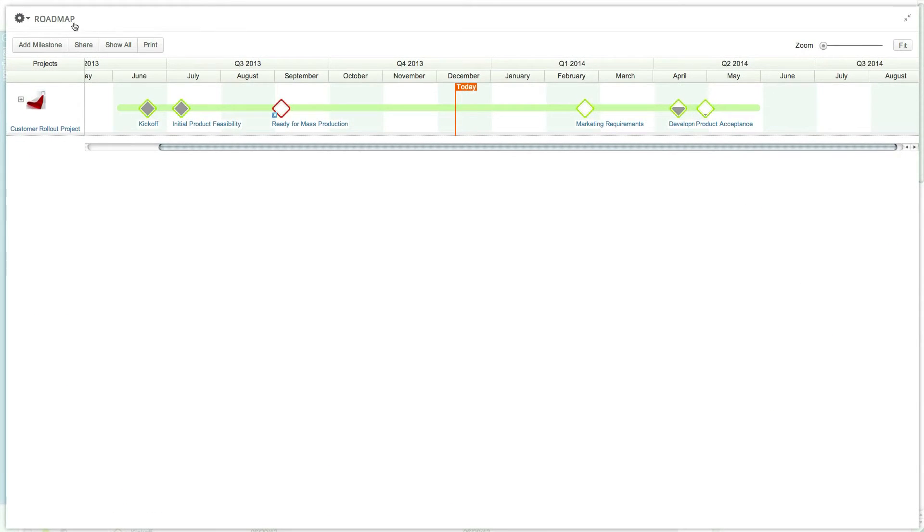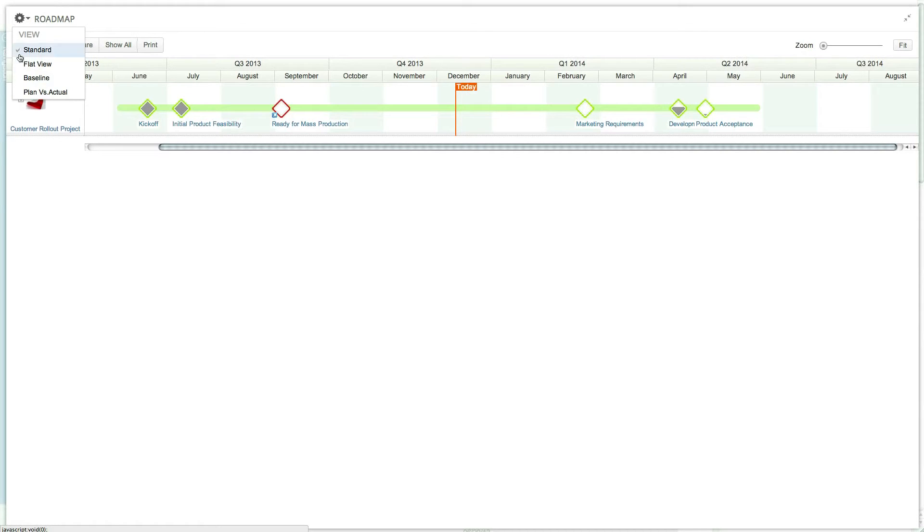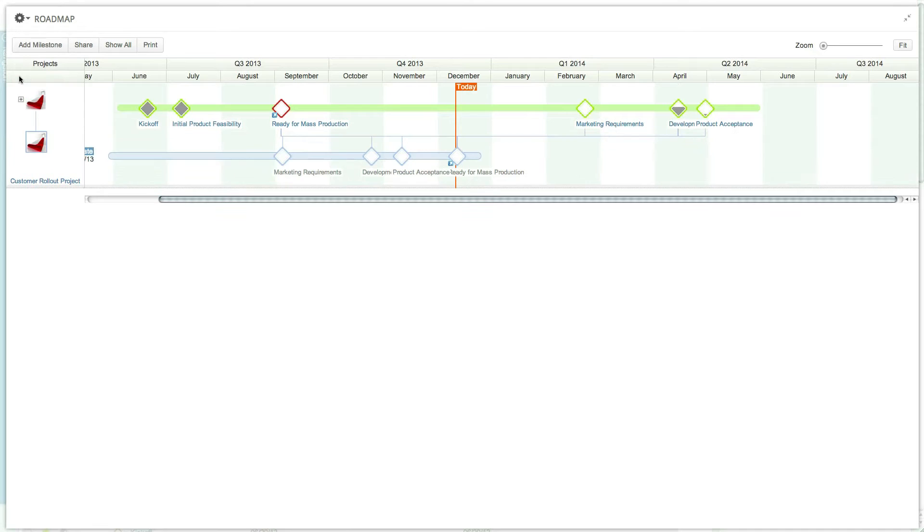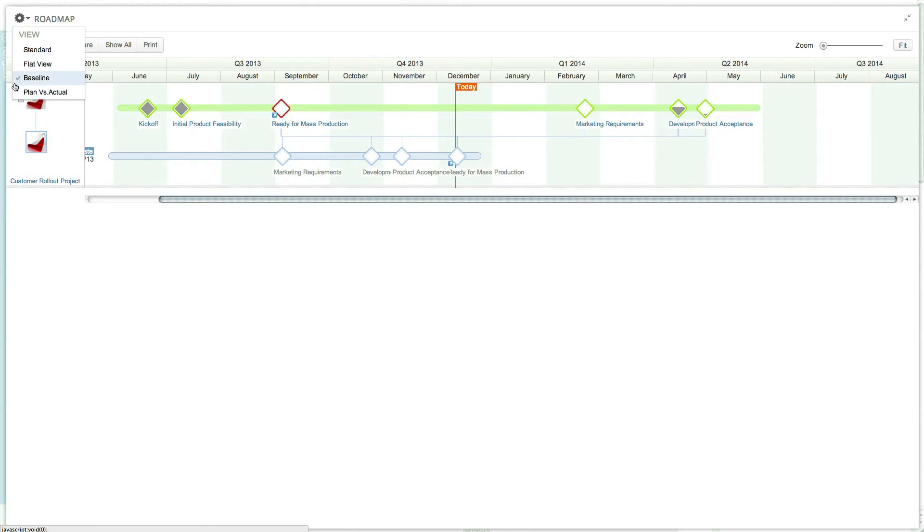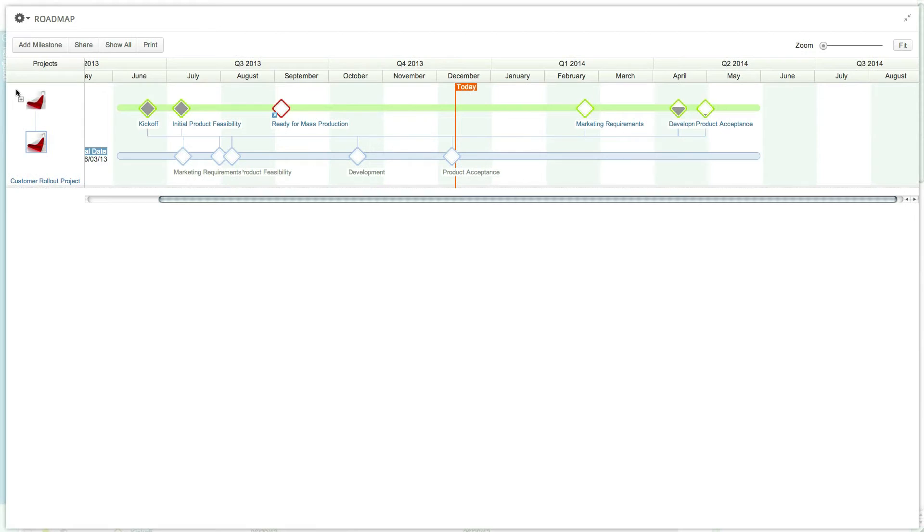You can switch between the standard roadmap scheduling view, the baseline view which shows the actual scheduling and progress review above the last saved baseline view, and the planned versus actual view which shows both values from the planned and actual scheduling fields.